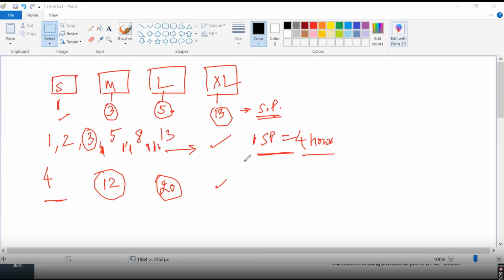You might see variation. Well, I guess Suchitra, you've been working in the same domain. If there is something else that you probably use in your real world practice, you can please pitch in. What is the value of story point that you use in your organization? Same, 4 hours? Yes, sir. Absolutely. But only if we were crossing 20, then we were again breaking them down to smaller sizes. Yeah, so basically it's more about the decision making that will be done.